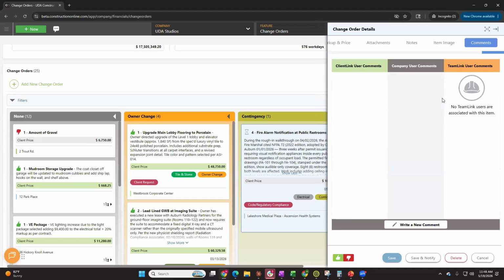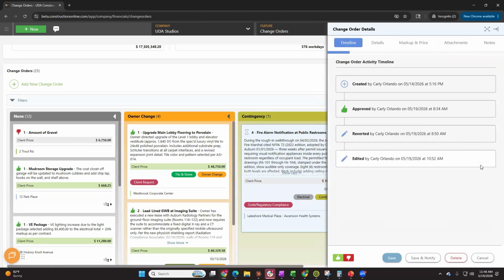Yeah, a couple of just other little points and best practices. Making sure that you're starting with drafts when you're collaborating internally. That's a great way to prevent accidental information from getting shared, or miscalculations or things like that. Linking the change orders to the estimate like we discussed, so it's easily viewable when you're doing your job costing. And finally, making sure that you're reviewing that change order summary on every project at a regular cadence.